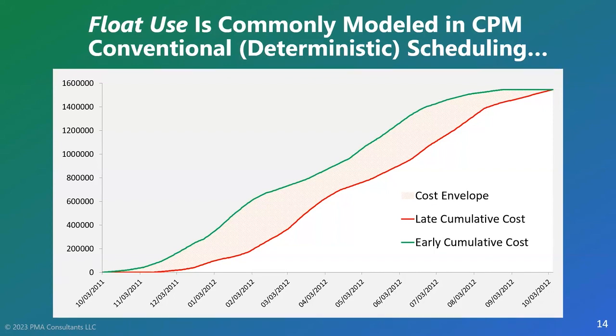Now, notice that in this curve, both curves finish at exactly the same time. Because on both curves, whether it's the early schedule or the late schedule, you are always using the one duration. But when you accept randomness, when you accept variability, it's not necessarily true that an activity will last the same if you do it at different times. That's the glitch, that's the catch.